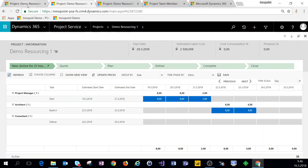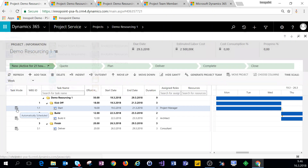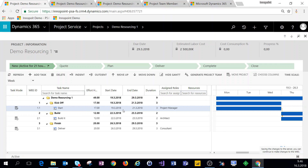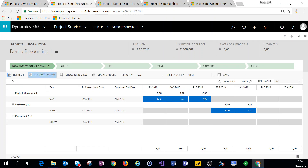If we change the task mode to manually scheduled and change the effort, then save the work breakdown structure and come back to project estimates, we can see that the work for this task is now evenly distributed across all three dates.